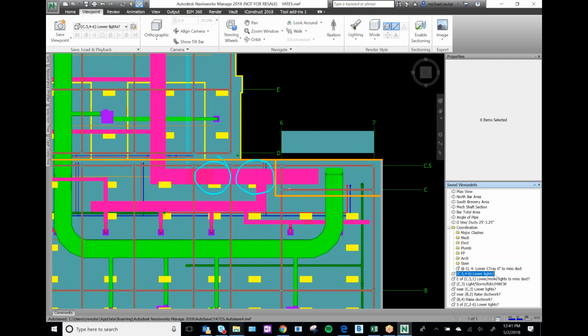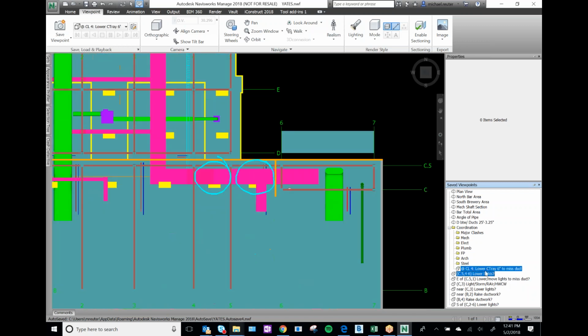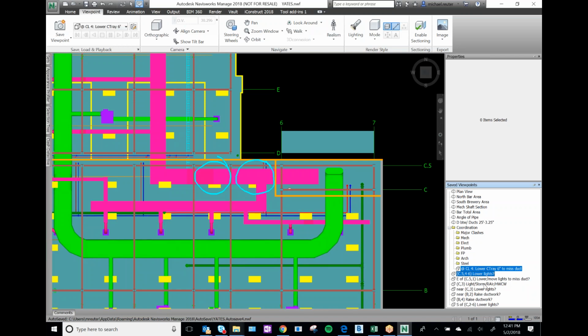So that's why I have a question mark in there. If it doesn't make sense, if the lights are at the right spot, then maybe we have to go back to the drawing board. We have to discuss it during the meeting. So again, for every single one of them, I located it, I gave a suggestion for what to change, and I marked it up.